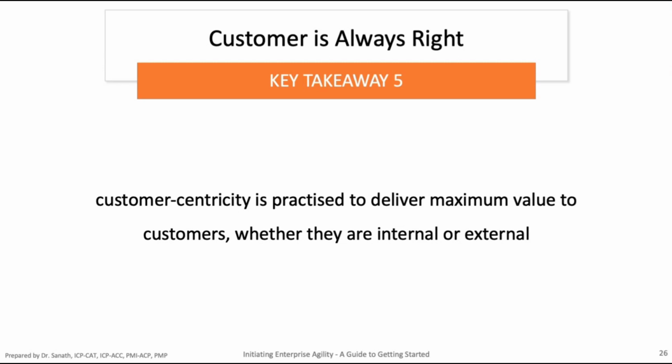But here's what I have to say. If you align with your stakeholders well enough, the rate of change will reduce as the project progresses. I repeat, if you align with your customers well enough, the rate of change will reduce as the project progresses. Meaning, I'm not saying there will not be change, but the rate will reduce. And that is what we're hoping for, right? As the project progresses, there's greater alignment between what the customer wants and what you want, and you're moving in that mode. That's what we're talking about.